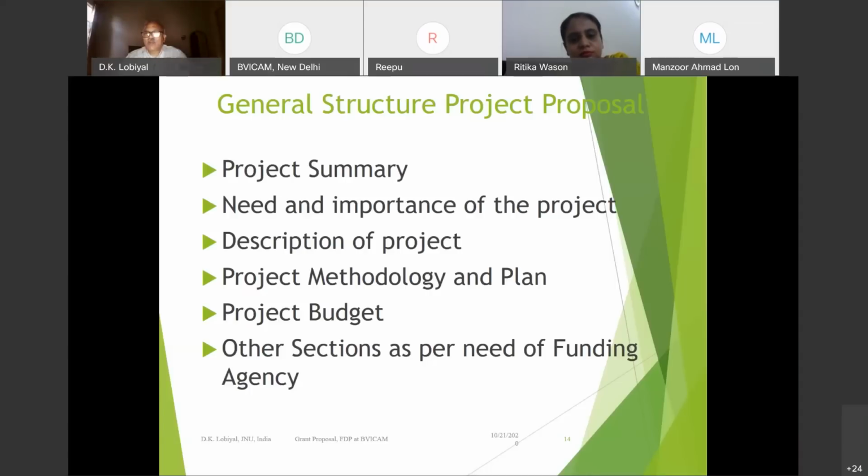Who was L1, meaning who gave you the least prices, then how many bids you have, 1 bid, 2 bid, meaning you have technical, then financial, all those you have to take, then tendering, then opening, then giving order, then supplying. If you look at this government organization, this is at times quite discouraging. But I'm not talking from the discouraging point of view, but I'm putting this point here. This happens. It takes longer period because many of us as teachers do not bother about the rules and we do not bother about knowing them and learning them.